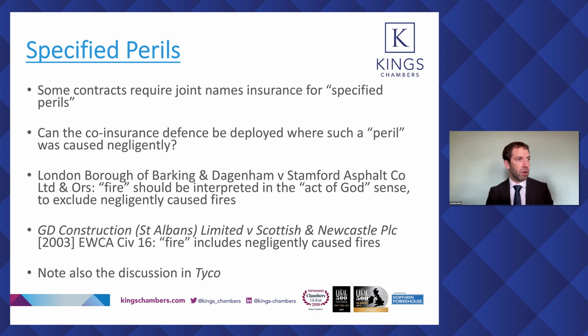In London Borough of Barking and Dagenham, the court said that fire should be interpreted in the act of God sense to exclude negligently caused fires. So in other words, if you've negligently caused a fire, you won't have a co-insurance defence. Whereas in the Scottish and Newcastle case, the Court of Appeal took a different approach and said that a reference to fire in specified perils means any fire, including negligently caused fires.